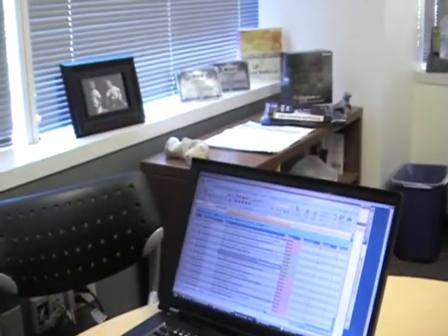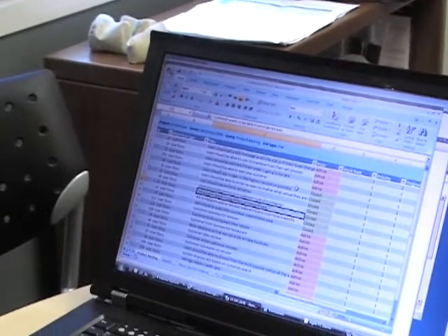So today, when you're planning your product backlog, one of the first things you want to do is put user stories in the system, and then you want to balance the work across your iterations, at least get a sense of what works by having iteration 1, iteration 2, iteration 3, kind of look ahead in capacity plans. So let me show you how this will work with TFS. One of the nicest things about TFS is that you have Excel, which you can use against the Foundation Server, which makes your planning much easier.